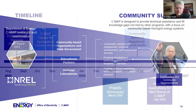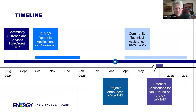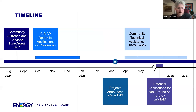Our timeline for the solicitation: the CMAP application is open now, with the plan to go through to the end of December — the 20th of December deadline. If that deadline is a problem for communities, we'd certainly like to hear from you. Projects will be announced in March, with the contracting process targeting the May-June timeframe for when contracts are in place, and then community support and technical assistance to projects will launch around that time.